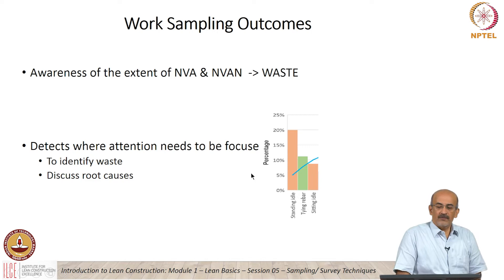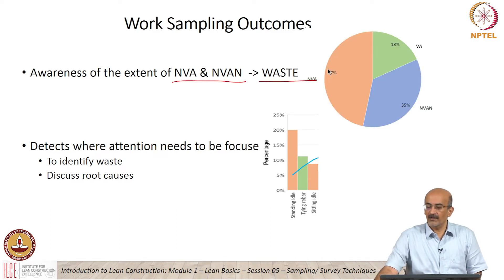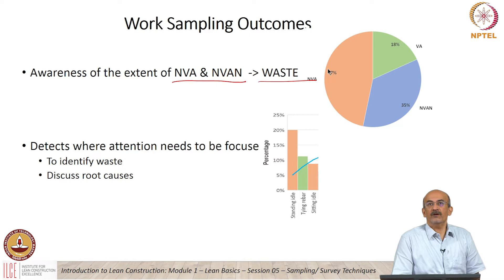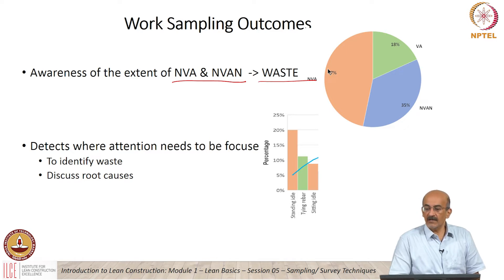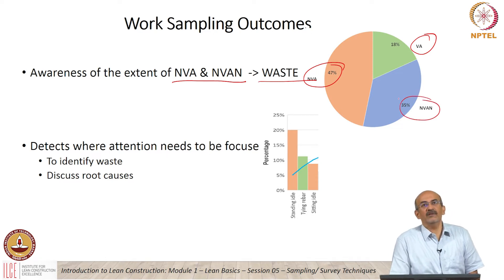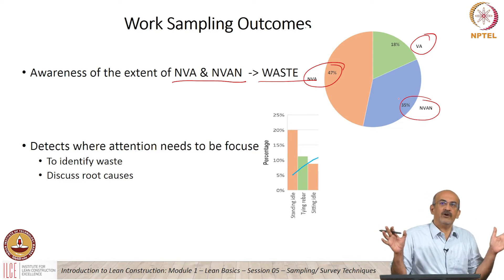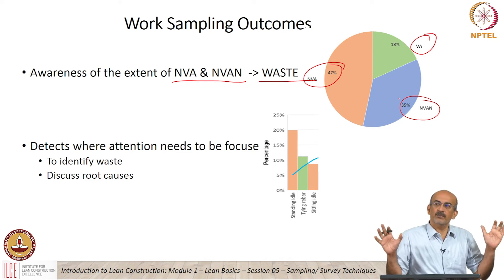When you look at work sampling outcomes, you can have non-value-added and non-value-added but necessary, and this indicates waste. Here is an example of a work sampling output. Value added seems to be very, very little — non-value-added is very high, and non-value-added necessary is also high. So there is something to wonder about here. From a very broad perspective, the value-added proportion is not good.